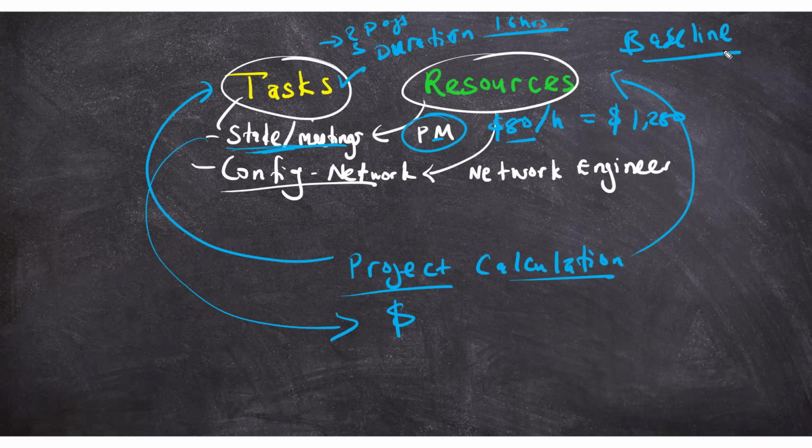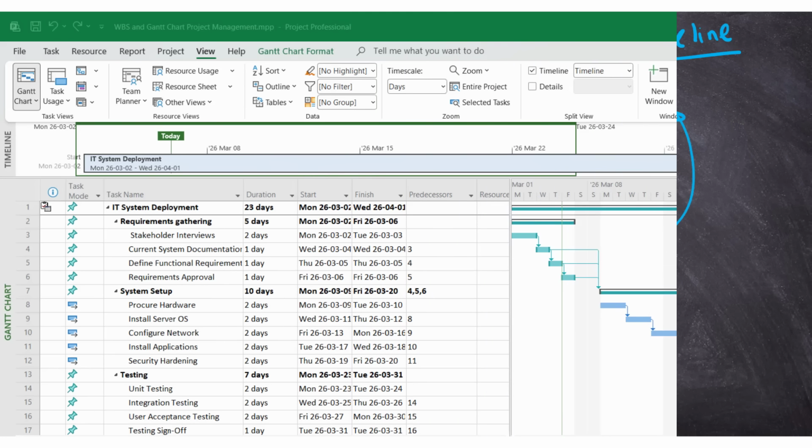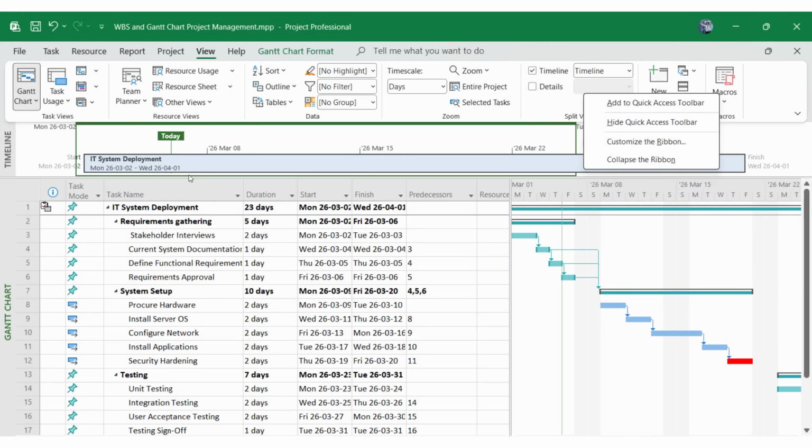So let's touch a bit on this and give you insights in terms of how you can go about getting started if you are maybe starting your career as a project manager or somebody who is just getting to use Microsoft Project to make sure that you are up to speed. Okay, so here we are within our Gantt chart. The first thing I'd like us to do is to make sure that we do not have any manually assigned tasks over there. So I would simply want to go and convert all these to automatic.